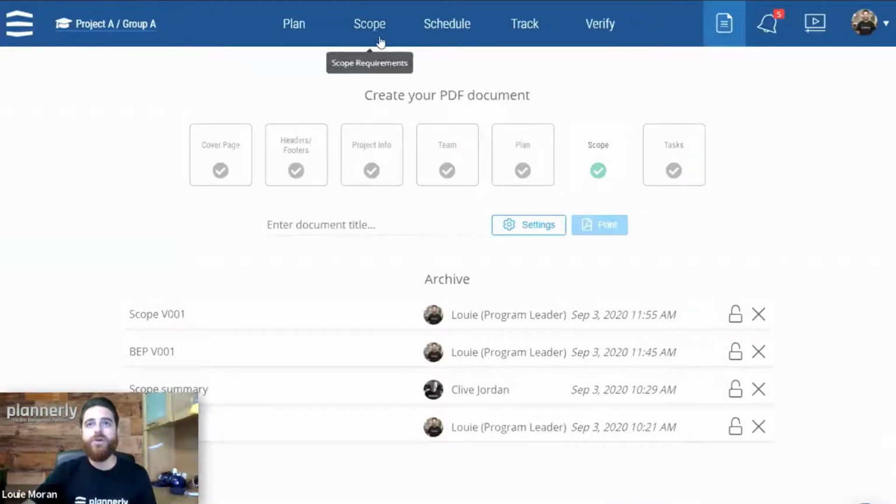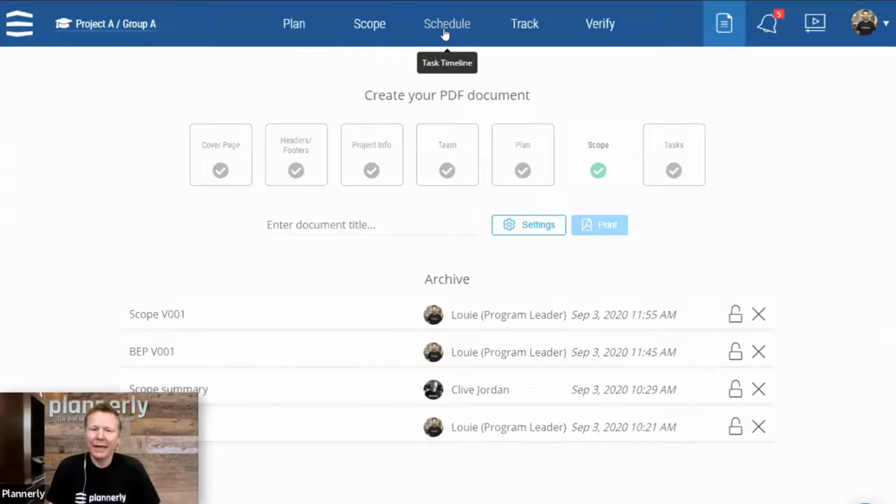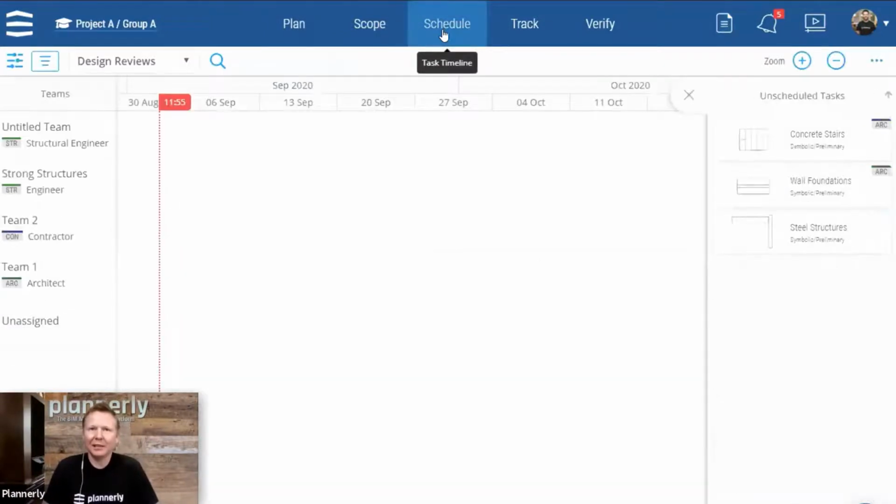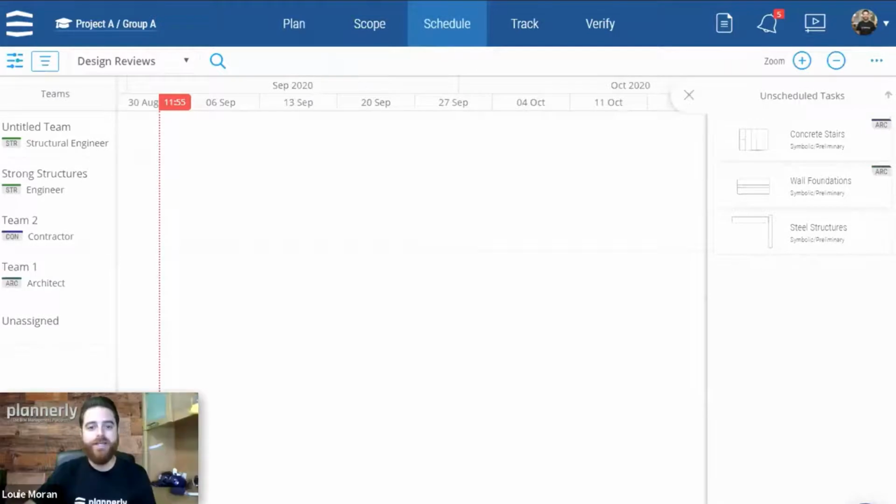All right, so we've created a plan, created a scope. What's the next step of the workflow? We need to manage those tasks in some way. So sequencing and then maybe tracking them. Yeah, good point. In order to have like a more proactive approach to coordination, what we've seen is teams sequencing tasks like they would in construction. You want to sequence mechanical before plumbing or structural before anything else.